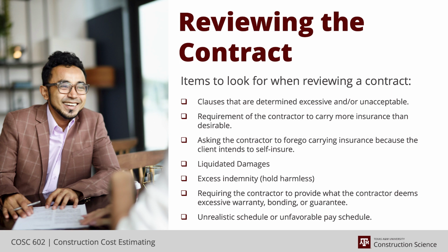Or at the end of the day, you may decide the risk of liquidated damages is too high and you have to no bid. In some cases, we end up pricing in what liquidated damages we think we're likely to incur, and then we see where we land in the bidding process at that point. But we've mitigated that liability to some extent in our bid.